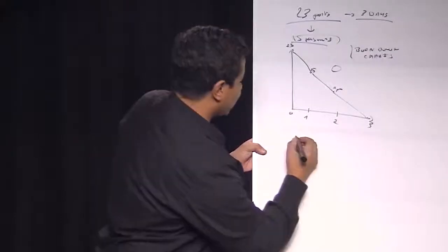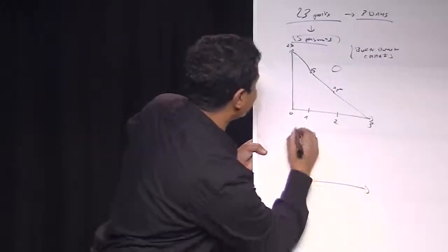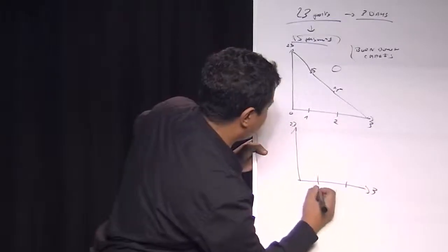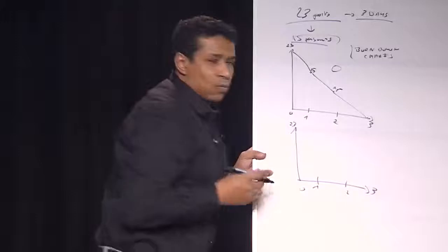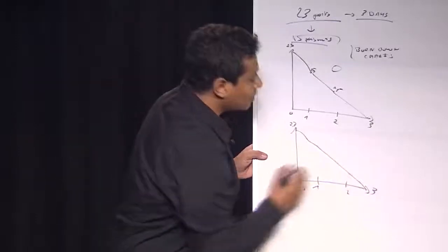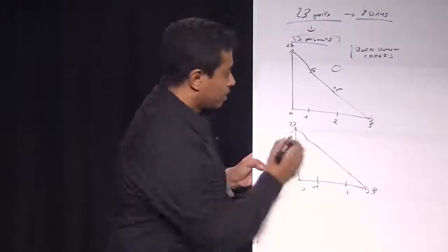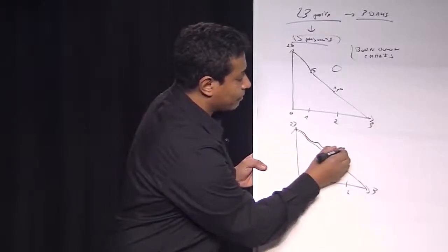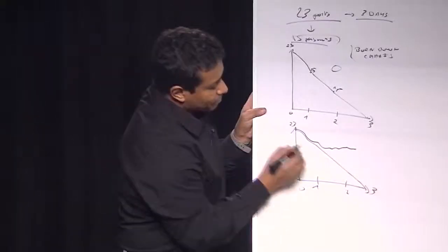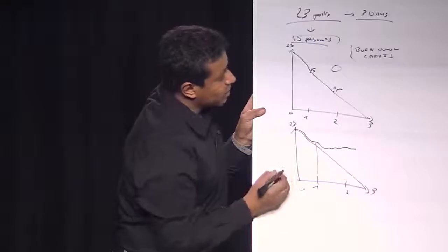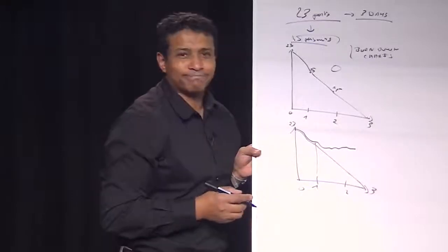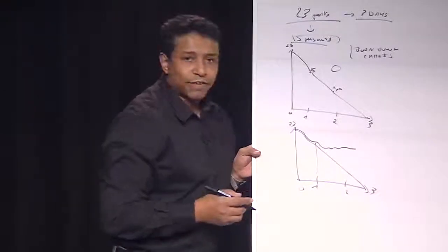What may happen is this. This is what we want, but this is what's going to happen. Why so? Because as a team, I realized the first day that, let's say, the footer is harder to do, that it cannot be done in half an hour.